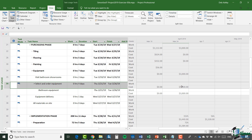From this you should have a reasonable idea of how the different types of resource work and when each is most suitable. Where you have an amount of work or a duration, work resources are often best. Where you have a task involving an amount of a resource consumed, material resources are good. Where the cost is a fixed figure, a cost resource is often the right approach. There are a couple of other cost examples I want to show you.